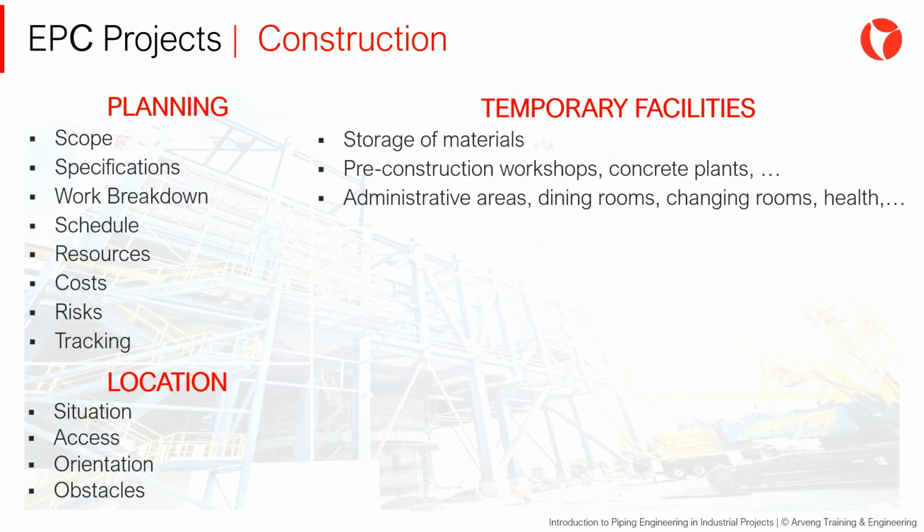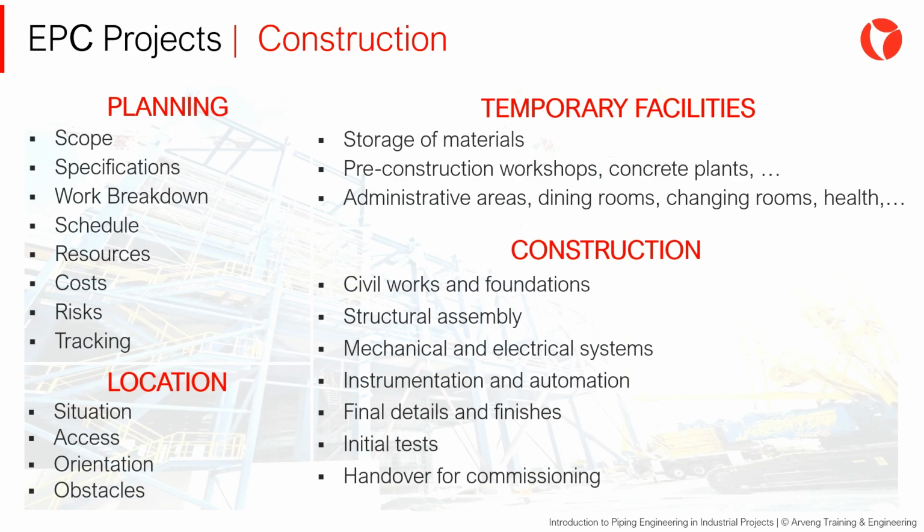Construction tasks often require temporary facilities for intermediate storage, pre-construction activities, and space dedicated to administrative areas, first aid, changing rooms, etc. The construction activity involves civil works, including foundations, assembly of structures, mechanical and electrical systems, instrumentation, etc. This phase ends with some initial tests and the handover for commissioning. It is important to note that a part of the engineering team is usually present as support and consultancy during the construction phase.